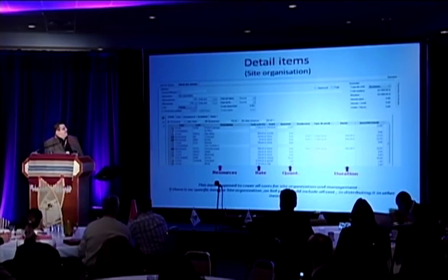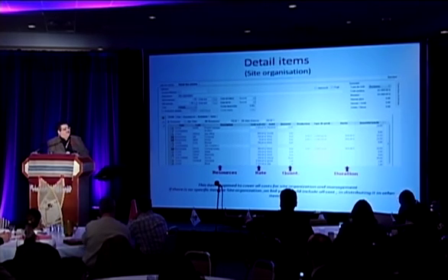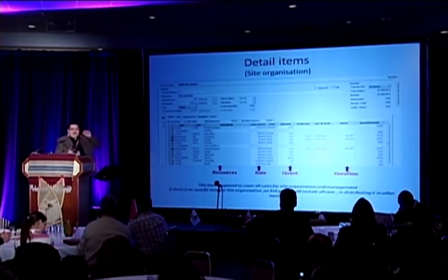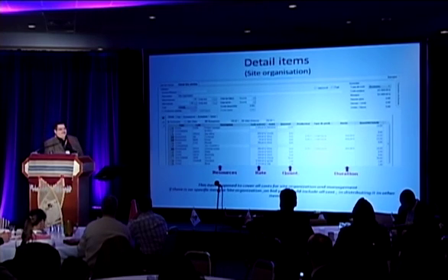Another very important item that people might tend to forget is your site organization. There's a cost to that. I've seen smaller companies that start up, and this is one of the items I always bring up. They ask me, how do you guys calculate that? Well, same as your production, it comes from experience, knowing, well, we rented an office trailer, it cost us $600 a month.